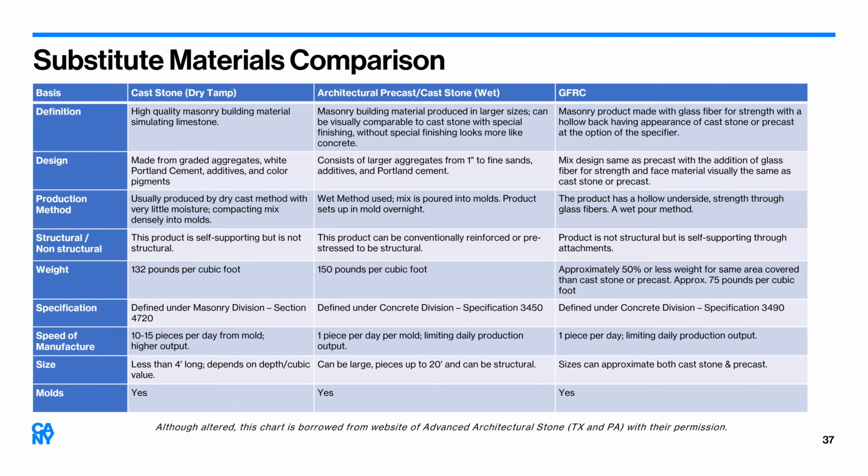The other is that, say you run into a situation where you can do some pins or patching. Per the requirements, if we're going to try pinning a unit, we pin it and then do pull tests to prove that the pins are working how we need them to. So often you're not only doing an inspection, but also a testing campaign to back up your findings and your proposed repairs. With the pull test, nowadays DOB is often requiring the pull test to be filed, especially when you're filing a FISP report, to have proof that you did all of those things before submitting.